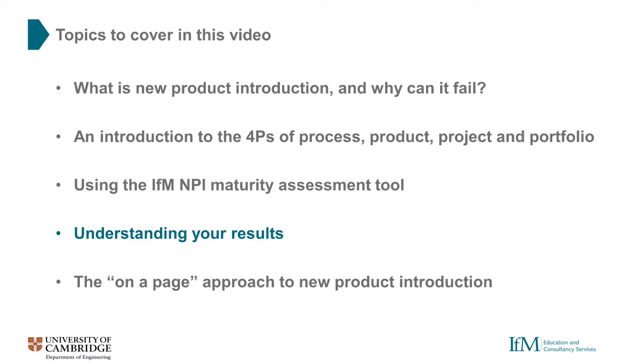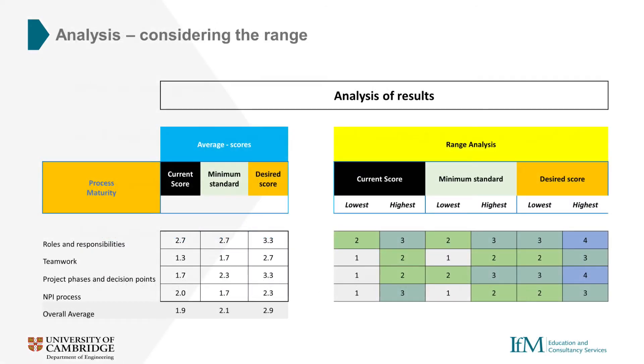Having assessed our process maturity, we can now do the same for each of project, product, and portfolio maturity using the templates provided. Once each individual in your team has scored each of the four P's, we can combine the scores together and start to review the results. Before we look at the average responses and draw some conclusions, it's a good idea to look at the range of responses received from the team members involved. For example, we can see that the current scores for overall process maturity range from three right down to one. You'll need to talk to the team members to understand the differences in their perspectives and see how they can be resolved.